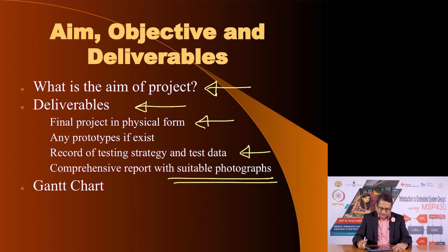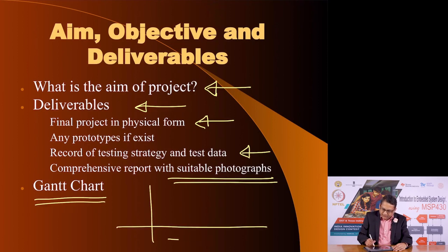Now, in all this, a concept called a Gantt chart is very useful. A Gantt chart is nothing but a two-axis representation where on one axis you set time and on the y-axis you put all the activities that you have to do. So let's say you want to plan. I'm going to take this much time to plan. Then you say I'm going to start